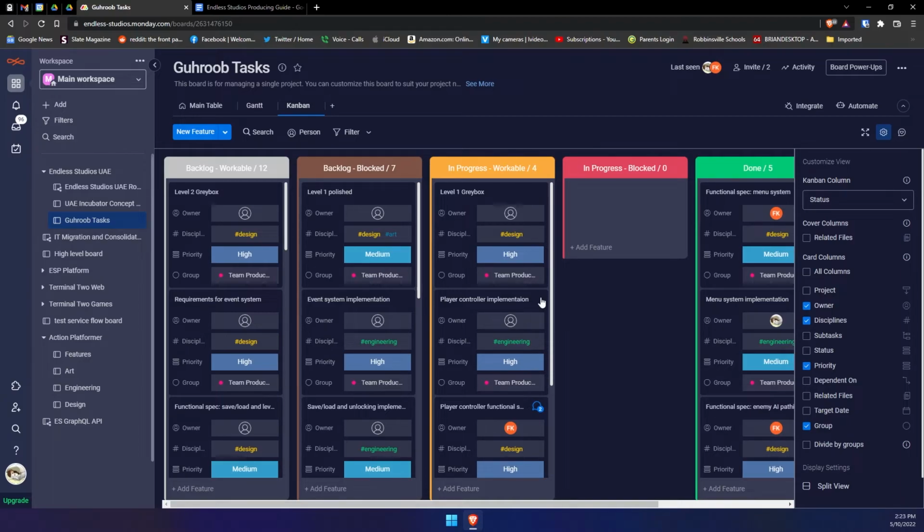The next question I'm going to ask myself is, how much time from designers do we have on this project? If there's only one designer on the project, as is the case with most of these projects, and the designer has 20 days on which they can work on the project, well, then we're doing pretty good, right? 18 things to do, 20-something days to do them in, we're doing awesome.